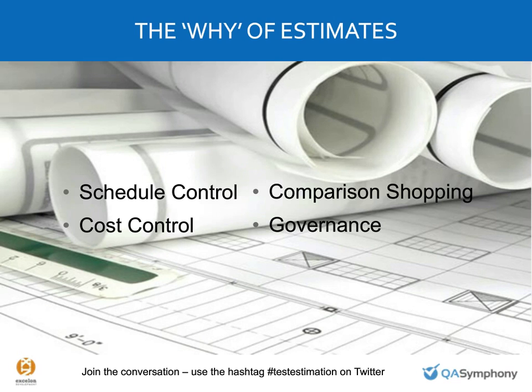I'm missing anything there, Justin? One more. What's that? Go ahead. I just thought of one more reason that's actually not on the slide, and it's kind of meta. Another benefit is that it helps you to better understand what you're building. You can't make estimates without, to some degree, breaking down the work into pieces and thinking about what you're actually going to have to do to accomplish those goals. So in the process of estimating, you get a small plan in your head for what's going to be built or what's going to be tested.